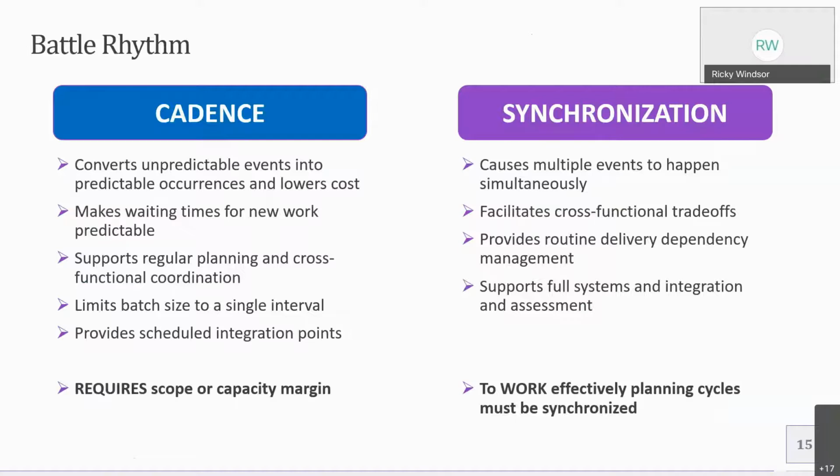It also allows you to develop schedule integration points, which feeds into synchronization. A good way to look at that is if you know you're going to have your risk assessment report and it has to be signed off by another organization, then you can coordinate when it's going to be done, how it's going to be done, and how it fits right back into the next step, right?